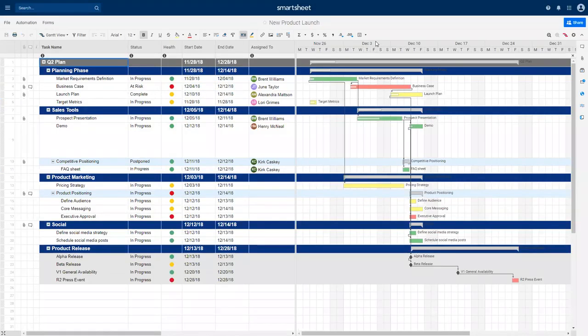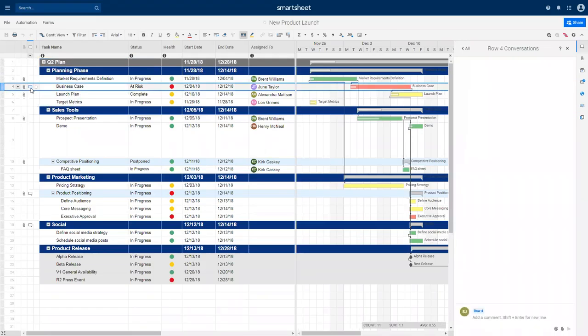As I mentioned earlier, Smartsheet is designed to make teams work together more efficiently. One of the noticeable features in Smartsheet is commenting. Clicking the small comment icon in the column opens a comments panel on the right side. I can add important comments about the project. I can use the @ symbol to mention a team member in any comment. This will send an email notification to them. All the comments added to a task can be seen in the comments panel.